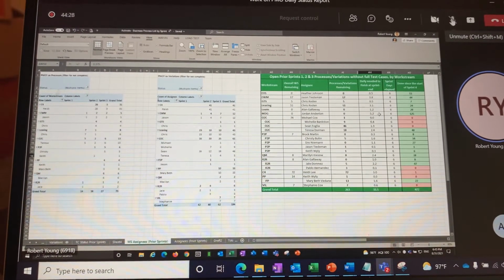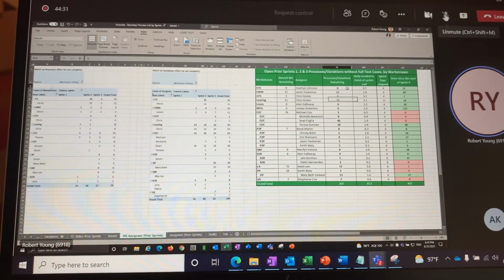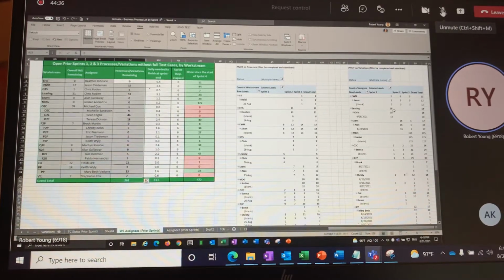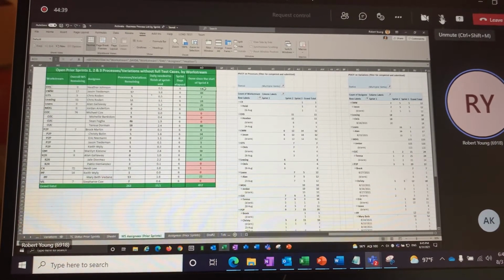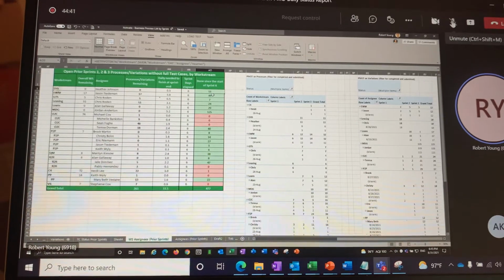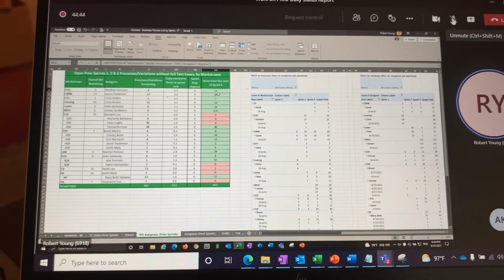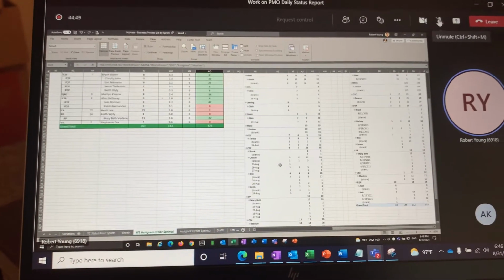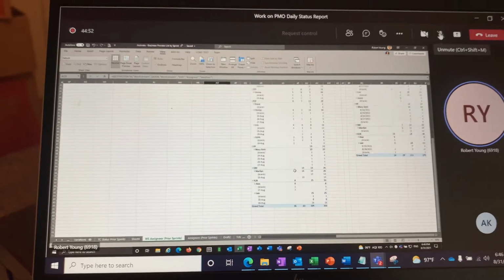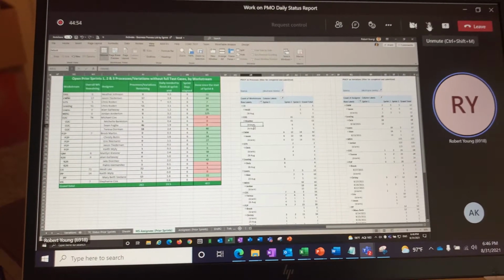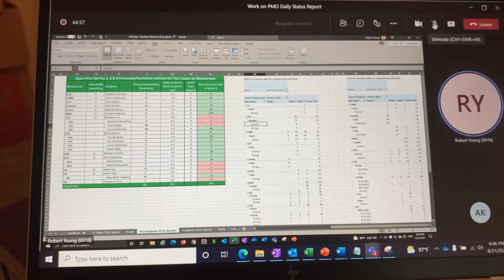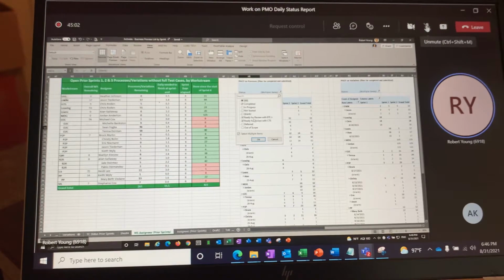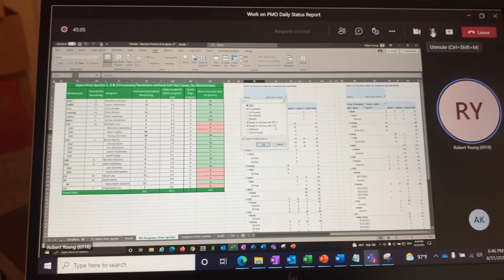The last thing, so that's all for this side. Okay. Now, if you go over to the right, there's another set of pivots. Now we have to calculate the number that they have completed since the sprint started. So this is where potentially there's a little bit more work, right? Because we have to filter by dates relevant to the sprint, or it could be blank because it's in progress. These pivots look at what is complete, and what is ready for review with the BTLs or with CTS.